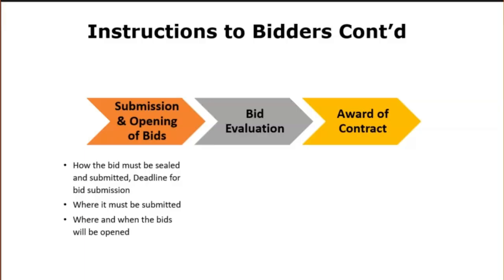Here you will still get information relating to late bids. It says late bids will be rejected and will be returned unopened to the bidder. It also covers the procedures by which a potential bidder may withdraw, amend its bid, or substitute any part of its bid prior to bid opening.